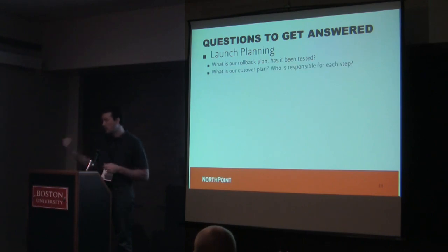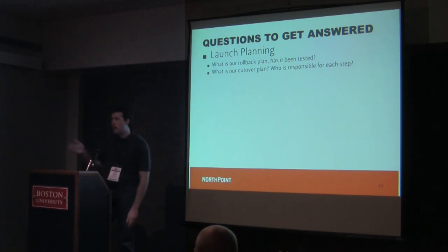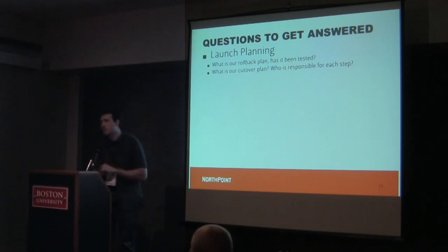And of course, the cutover plan, actually launching it, and who's responsible for every step. Making sure that you have, if you need system administrators, if you just need someone available to click a button, or if you need an entire team, getting all those people together, getting a list of names, and later I'll say all their contact information as well.